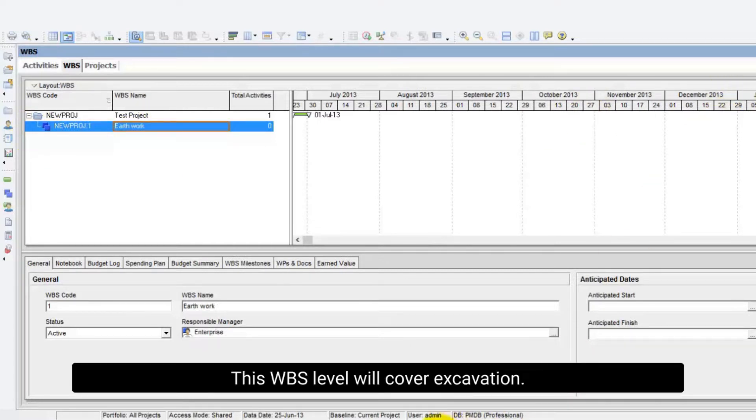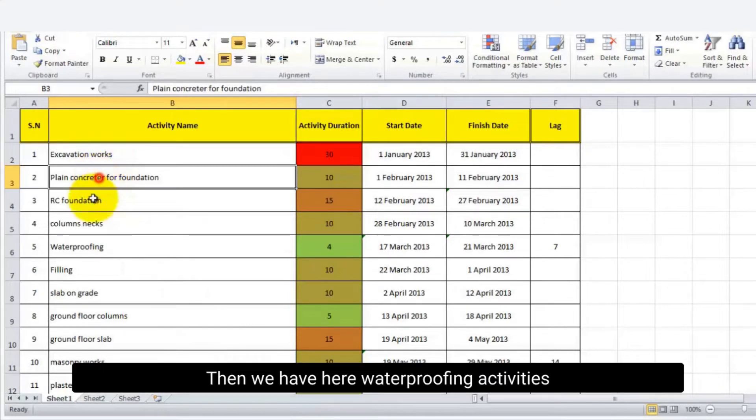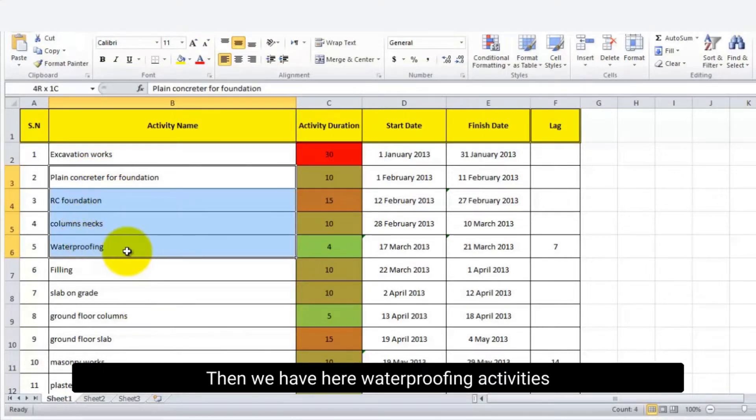This WBS level will cover excavation. Then we have here waterproofing activities. And column neck until plain concrete.